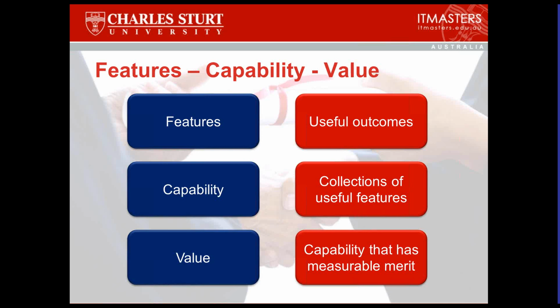So the organization and the product owner must understand that the first priority of that person is their role as Scrum Master. And that means they need to be very careful of making sure they have enough time to do that function properly in any given sprint and in between sprints. And if they take on additional production work during the sprint, it needs to be mitigated by that factor. Not impossible. Most purists of Scrum would say, look, not a good idea. But the realities of small business mean that bad ideas can be made good.